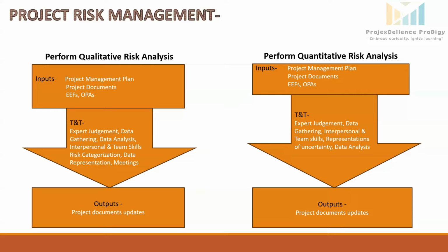So the components like the risk management plan, which defines how the quantitative risk analysis will be performed, what resources are available, and how often it will be done. Scope, schedule, and cost baselines will provide the starting points to analyze how risks and uncertainties may affect the project. Project documents like the assumption log. It lists the key project assumptions. If assumptions are uncertain, they may be considered as risk. Cost and duration estimates, which are used to assess how price changes or delays could affect the overall budget and schedule. Risk register and risk report identify key risks that could have a significant impact.